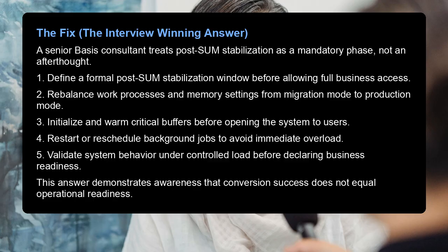The fix, the interview-winning answer. A senior Basis consultant treats post-SUM stabilization as a mandatory phase, not an afterthought. 1. Define a formal post-SUM stabilization window before allowing full business access. 2. Rebalance work processes and memory settings from migration mode to production mode.